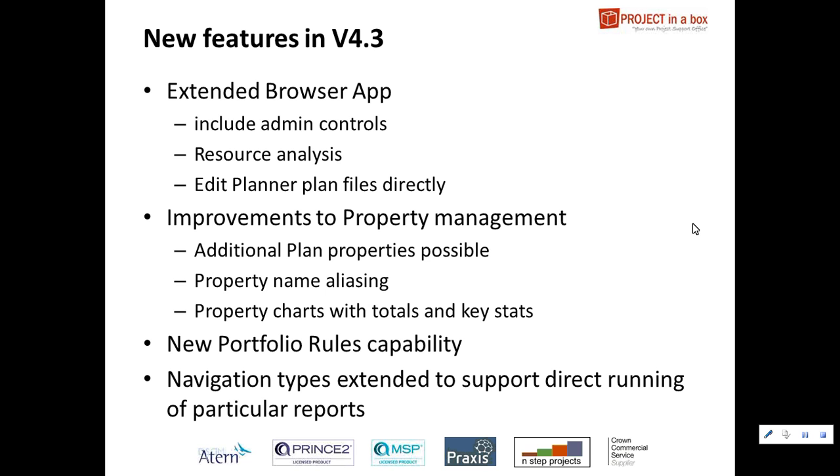So if you have 5 projects that are on track and 3 that are in exception, and 1 that's not yet started and 1 that's failed, it'll total those up for you at the end of the row next to your total project costs. You'll see a count of that sort of statistical analysis of those entries. So this is again really useful for quickly being able to look down a list of maybe 50 projects in a table and get a feel for all that. We can also then put those now onto the charts.